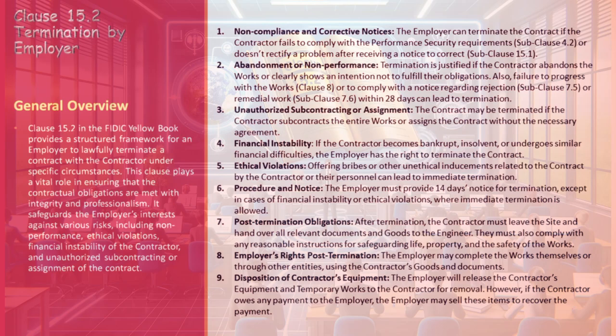Employer's Rights Post-Termination: The employer reserves the right to complete the works using the contractor's goods and documents, either independently or through other parties. Disposition of Contractor's Equipment: The contractor's equipment and temporary works will be released for removal. However, if the contractor owes the employer, the employer may sell these assets to recover the outstanding payment. Understanding these points is vital for effective contract management under the FIDIC framework.